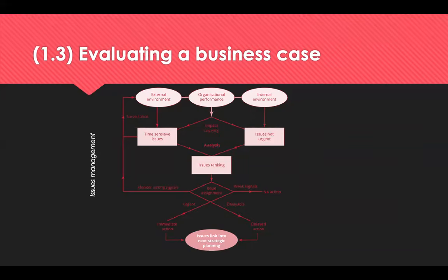Now, the business case should show that a number of options have been considered to reach the objective before selecting the best one. Strategy options can be generated by using brainstorm techniques with peer groups. It's possible to benchmark similar strategies used by other organisations. Hybrid strategies can be developed by comparing features of existing strategies and combining them to form new ones. And the cost benefits analysis will compare the costs with the benefits of each of the options that have been presented, as well as the risks.